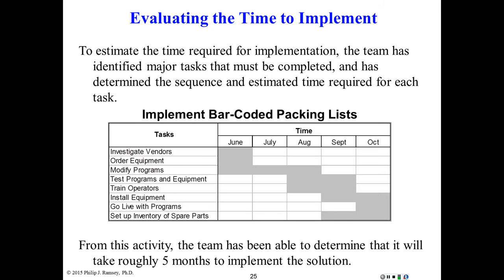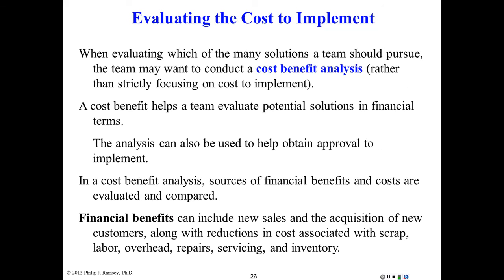And here's an example where people have put together a Gantt chart of time. That may be a tool that you can use if you're familiar with them. Microsoft Project, if you have it, will do Gantt charts. So you plan out what implementation is involved, and how long it's going to take. Again, you have to do cost benefit analysis. As I've said before, if it's going to take a lot of resources, a lot of time, and the payback isn't there, then the project would not be a success if we went down the path of those specific solutions.